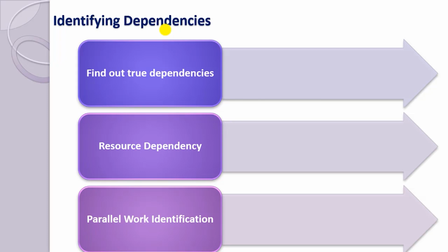So identification of the dependencies helps you to know what the loopholes are. For example, all the sections of the website design that we have seen as an example that we were planning to build depend on some agreement on an overall design. The whole website design is dependent on two crucial items: one is content and one is interface. The whole schedule depends on this, and you can achieve the timeline only if the client approves the layouts. Likewise, every project has such dependencies that need to be identified.